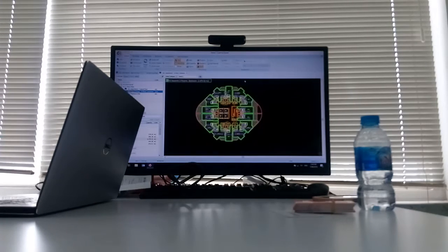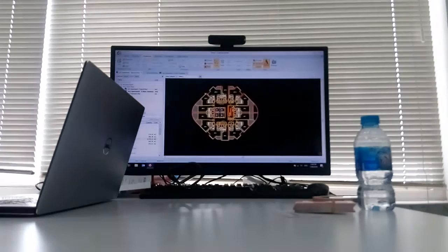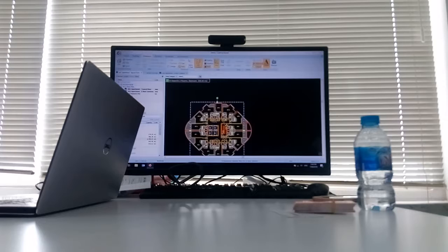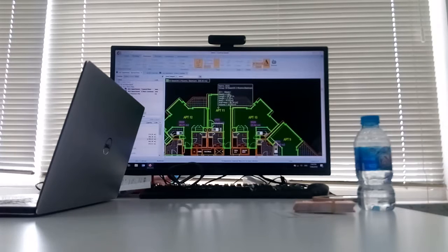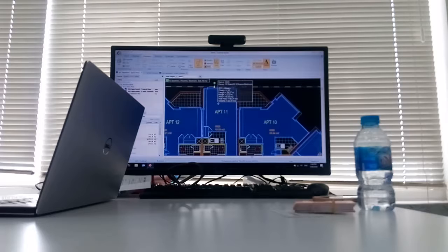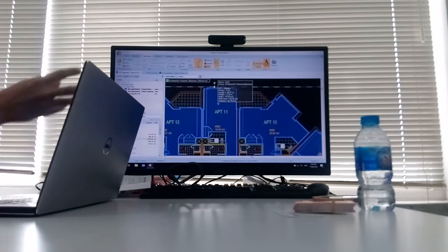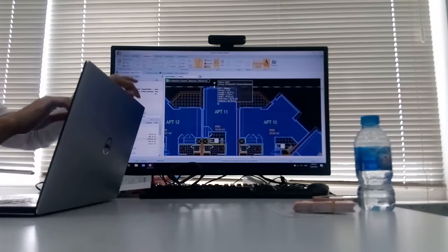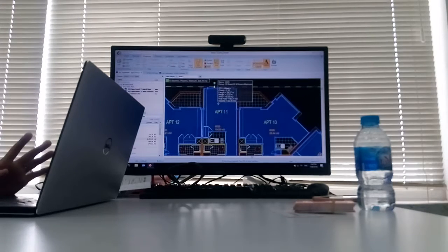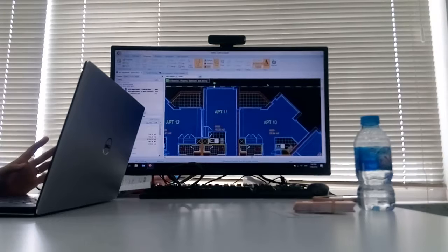And let's say for example your ground floor and the first floor have a minor difference. How do we make those changes? You can see I can select in area, highlight all the items that I measured here, and copy this dimension. Then I select the other floor drawing and paste it here. Then you can move the drawing until you have the correct alignment. Any specified item you want to copy, or you can copy all of them. You can use Ctrl+C, Ctrl+V, the shortcut keys. Copy and paste, it's as easy as that.